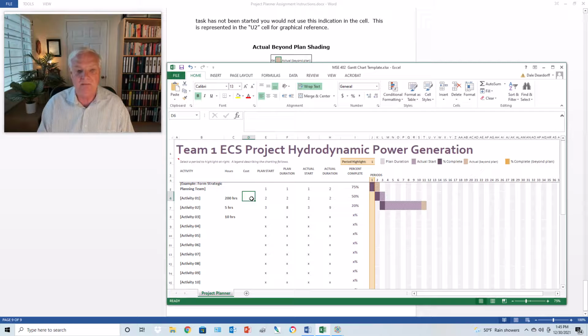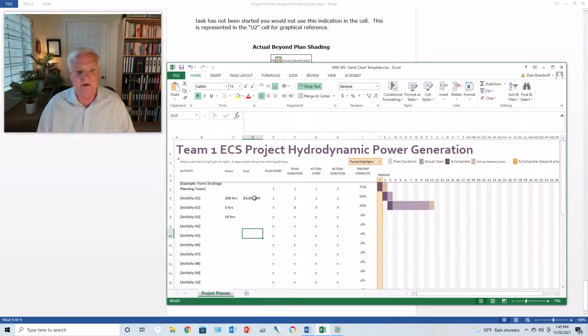So you could tell me that those 200 hours, at an hourly rate, cost-wise, could be 20 bucks an hour. What would that be? You can create a formula for yourself. So maybe this is $4,000. Maybe that's what we create for that particular cell, and you can give yourself a running cost.